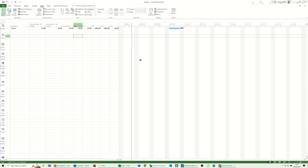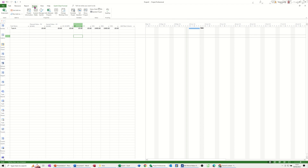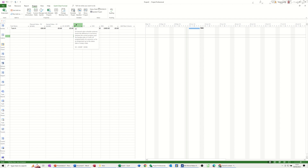When I apply that, at the moment everything's zero because nothing's been updated. You should use the status date. If I go back to Project and set a status date — this task is due to start on Monday the 5th. By the end of that date I should have spent £80 and I haven't, so this is a negative. If I hover over that, it's telling you the schedule variance shows the difference in cost terms between the current progress and the baseline plan. Because we haven't done anything, that's now showing a negative, which is not good.